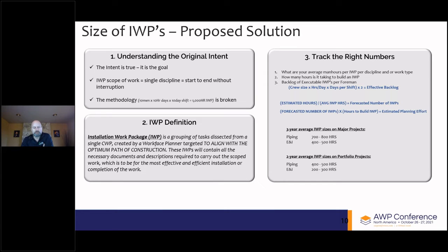These IWPs will contain all the necessary documents and descriptions required to carry out the scoped work, which is to be for the most effective and efficient installation or completion of the work. The focus in terms of the hours is more to be on the executable IWPs in each foreman's backlog to keep their crews busy for 2 shifts.